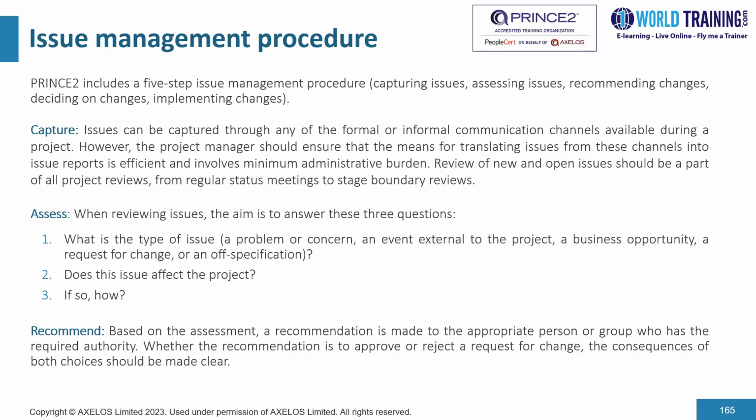Is it a problem or concern? Or is it an event external to the project? Is it a business opportunity? Is it a request for change or an off specification? Second question is, does this issue affect the project? And the third question is, if so, how?